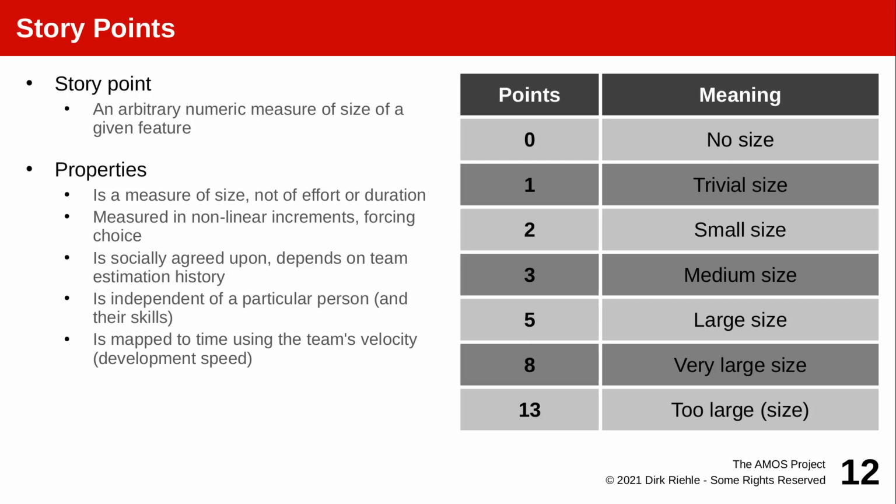And the key challenge here is to get started. Once you have a couple of times estimated a feature to be of a certain size, the only thing you need to do in the future is for same or similar size features to land in the same category. It does not have to relate to a particular amount of time. The key is if something is a medium-sized feature, all future medium-sized features should also be a 3.